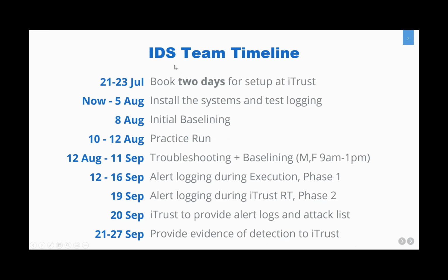So a more detailed timeline for all the people present here is that on 21st to 23rd of July, that is from now until end of the week, we request you to book 2 days for setup at iTrust, and I'll share the steps for the setup in the next slides. But essentially, this means that we want IDS teams to come down physically to iTrust and spend 2 days, 2 days of their choice in the next 2 weeks to install their systems and to test if logging and other things are working correctly.